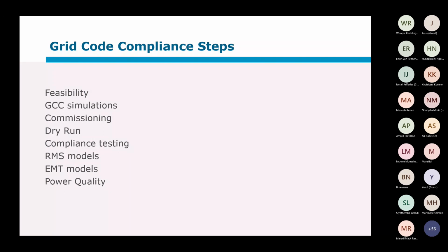Any of the renewable generators only get temporary exemptions, which means they have between 6 months and 2 years to fix whatever problem and become grid code compliant. But yes, it's also debatable whether that's applicable.